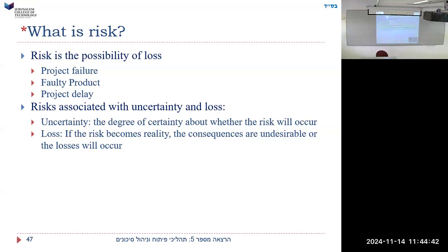How likely is it that, let's say it's only 1% likely to happen, but the payment is going to be $1 million. So how do I evaluate that? So it's 1% times 1 million. It's a 1% chance that $1 million will happen. It's true that we actually have to pay the $1 million, but right now I can give it a cost of 1% of $1 million, it would be 10,000.